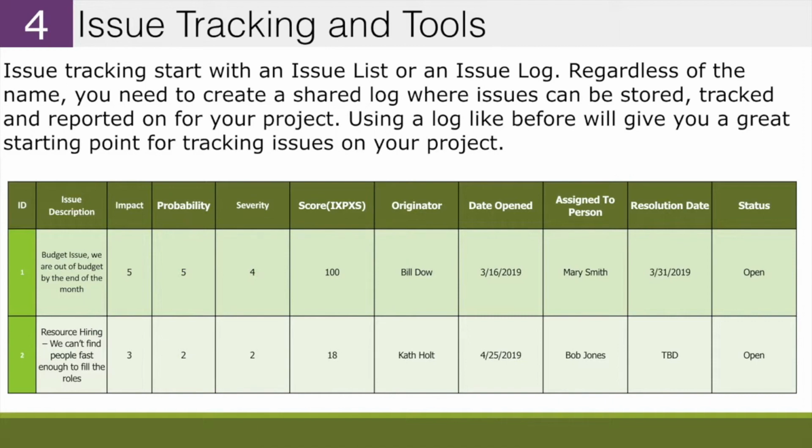You want to get that in a place where everyone on the team can access it. You want to get some good details in there. Of course, you can add whatever fields you want. I really like the impact, probability, and severity and doing that scoring. But it's up to you. There's a million different issue logs out there. But I think you have to have something. You have to make it available. And again, you really do have to understand which ones you're going to escalate up and which ones you can just let the team handle.